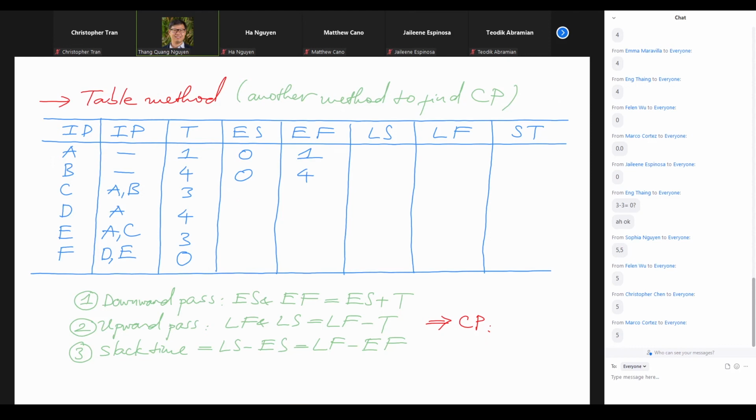So the answer here is 4. We have that 4 because of that 4, and we go forward by 3 weeks. So 4 plus 3 equals 7. So the same logic as before. It's just that we do not have the visual layout that we saw earlier. Now it's more abstract. We have to think a bit harder about how to go through the table.